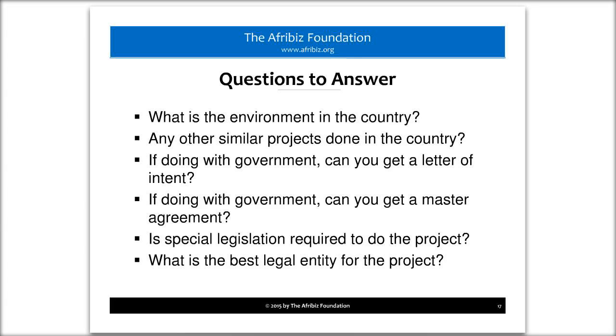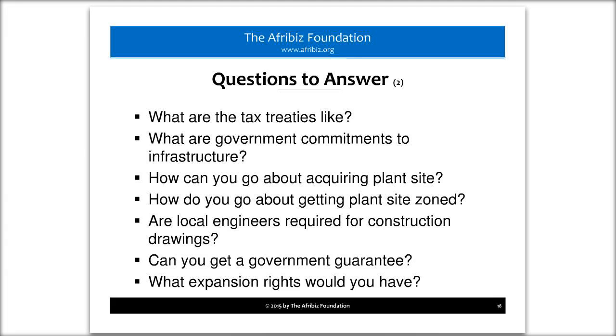Also, typically, these projects are going to be special purpose vehicles, SPVs. And so depending on the country, you need to know what the best legal entity is for the project. You also want to know what the tax treaties are like. Again, if you are not a resident of the country, or if your investors or your funders are not, they're going to want to know what the tax issues and finance issues related to that country are.